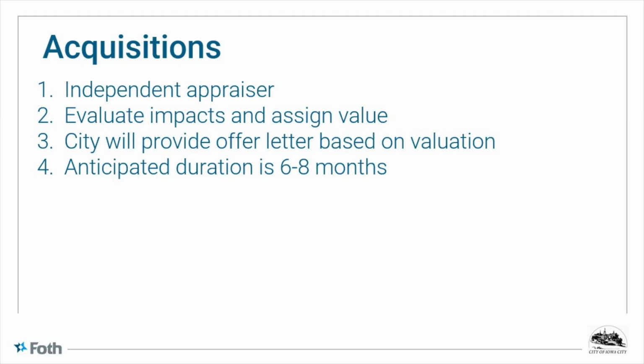We expect that process to take anywhere from 6 to 8 months. Again, sometimes there's a little back and forth there, so that's generally why we've got that blocked out for spring to fall of next year.